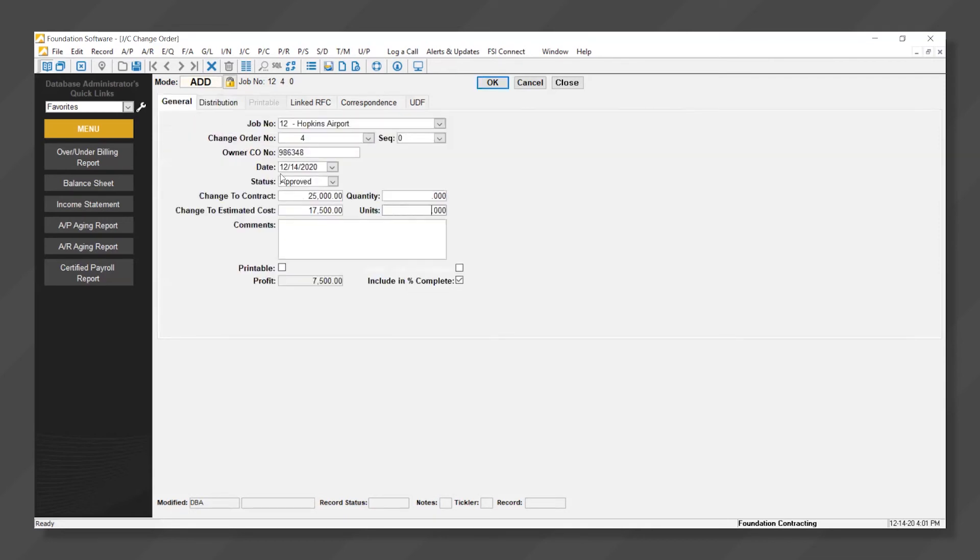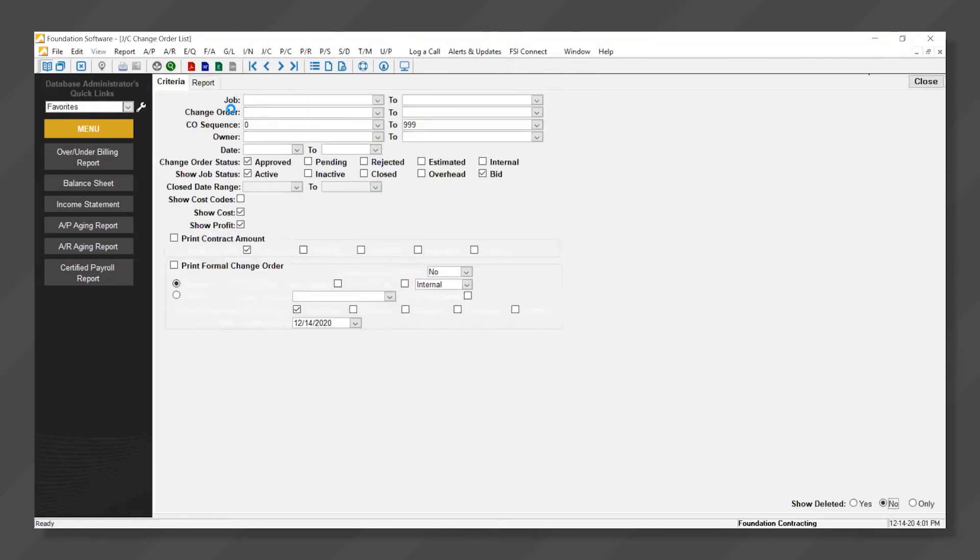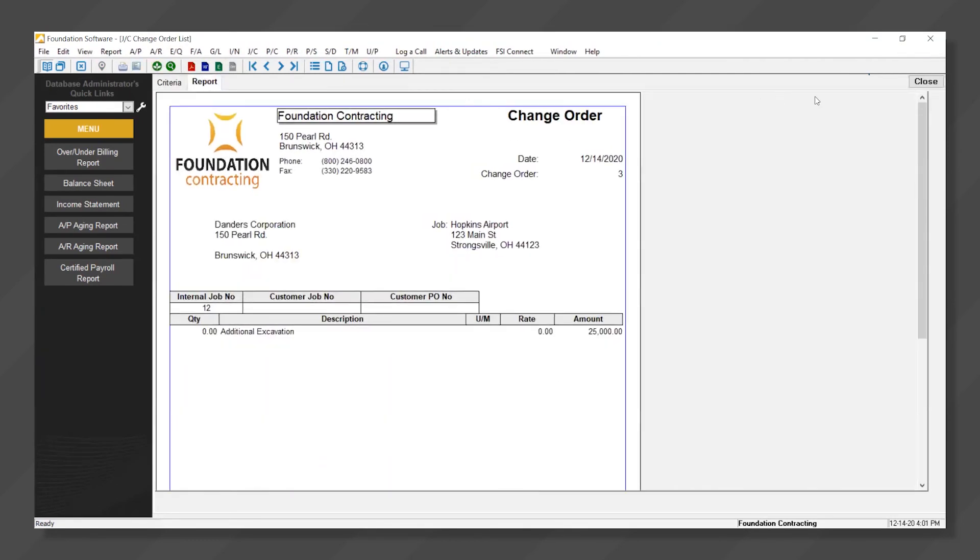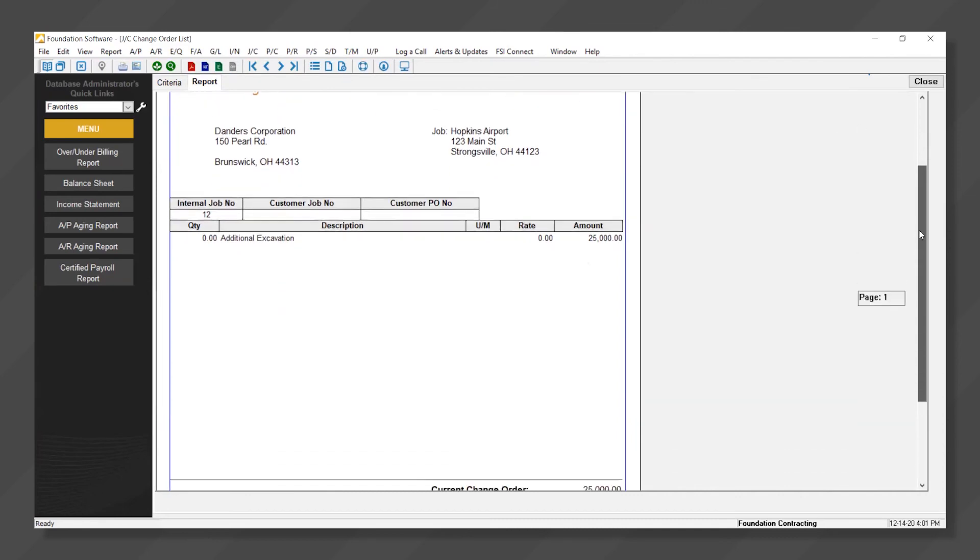Upon approval and saving of the change order, the over-under billing WIP schedule is immediately updated. The change order itself can also be generated directly through Foundation and is customizable via the Foundation Form Genie.